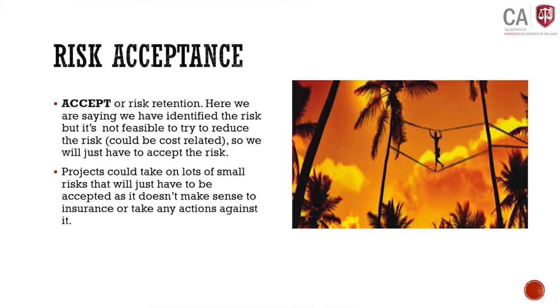Risk acceptance means you are going to accept because it is a negligible risk. As I said earlier, low frequency with low severity. Severity is low, there is no big impact. Under this situation, you can accept this, and accept the risk of retention. Here we are saying we have identified the risk, but it is not feasible to try to reduce the risk. It could be cost related, so we will just have to accept the risk. We can't transfer, we can't avoid, but we have to accept.